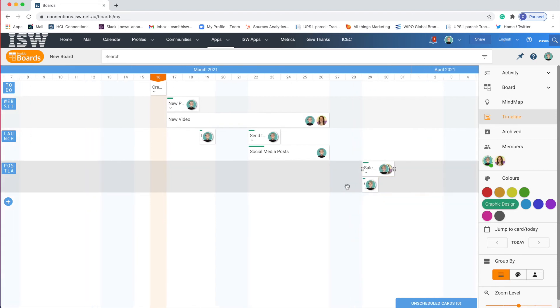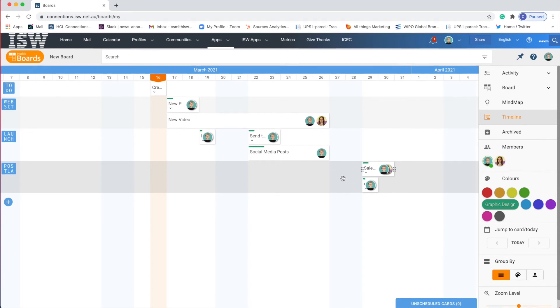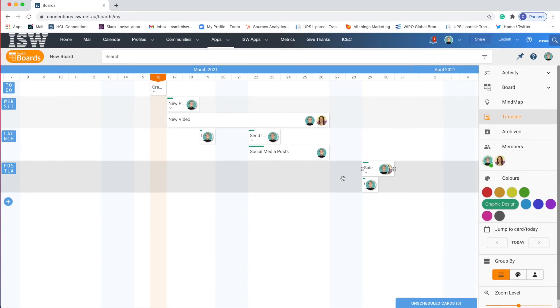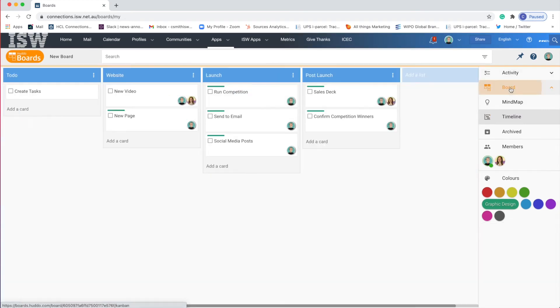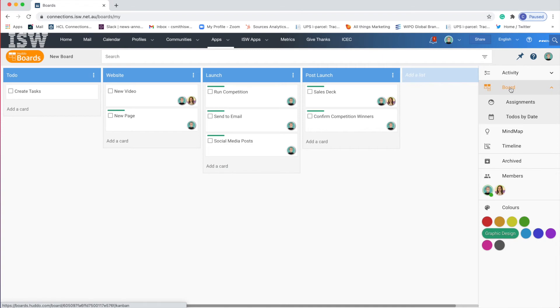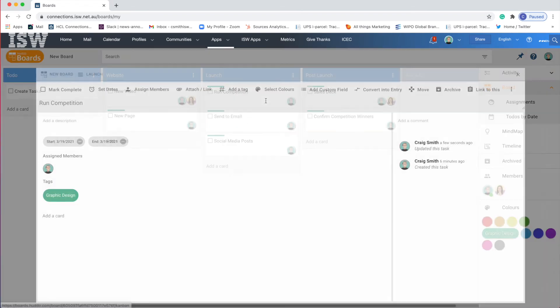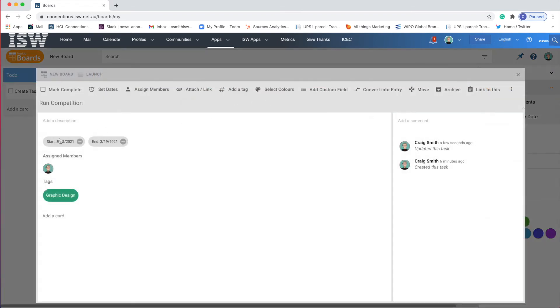So here you'll see I have this kind of Gantt timeline view of my project. Now if I go back to board view which personally speaking is my preferred view. If I click on a card and expand the options you'll see that there is now a start and end date added. So this just says when I think I should start it when I think it should end. But it isn't necessarily a due date per se.